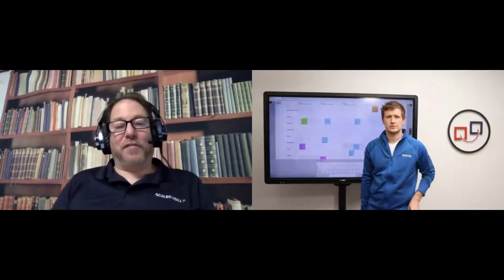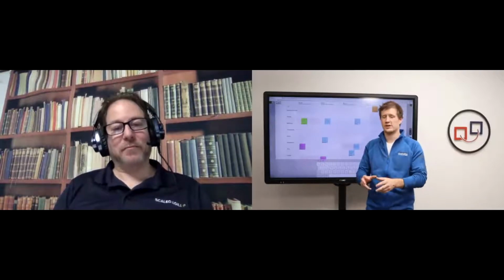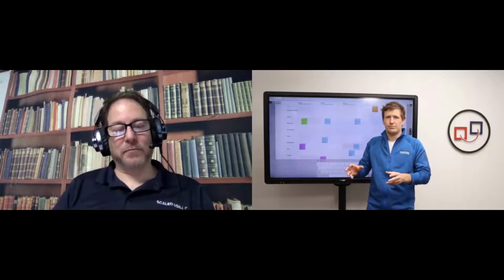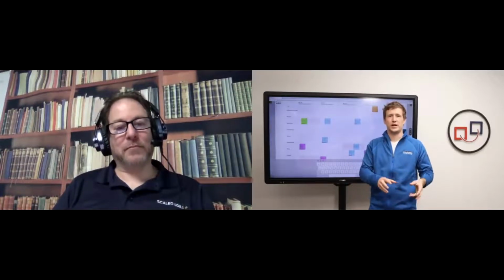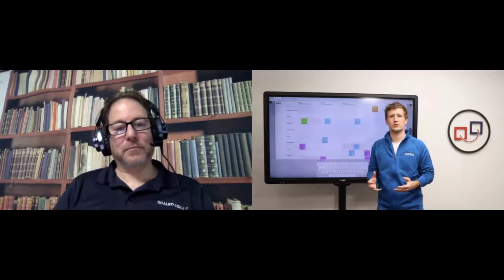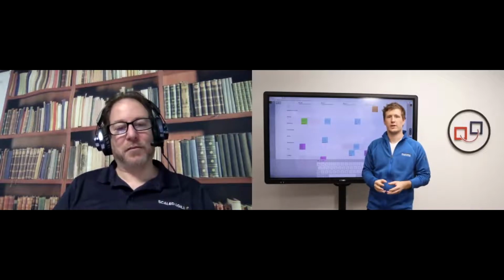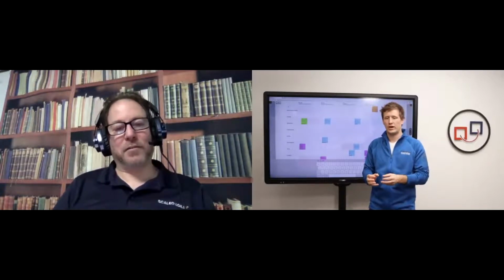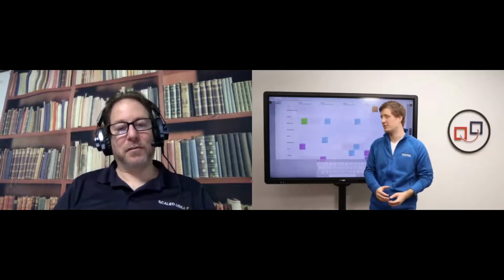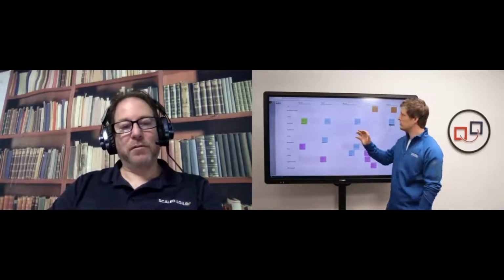As you know, there's a lot of things you need to do during PI planning. You need to have a single source of truth regarding the plan. Of course, there are chats and video, but regarding the plan, I saw release trains planning directly in an ALM tool like Jira and Confluence together with PowerPoint. And everyone got totally confused because they didn't know where to add what. I think that's really essential for remote planning: to have one single source of truth where everyone looking at the program board sees exactly the same program board with exactly the same dependencies on it.